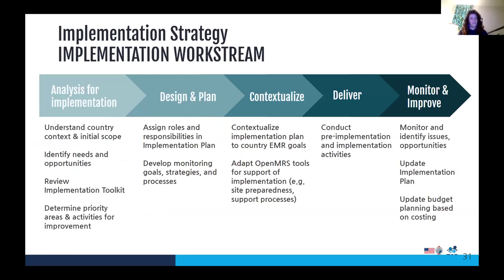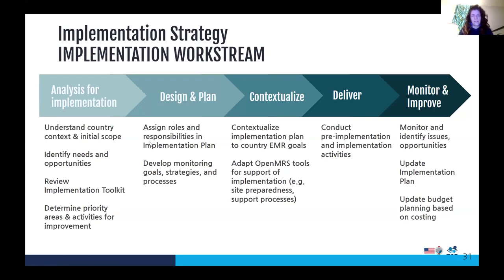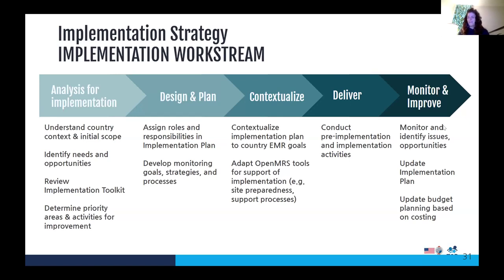The implementation strategy work stream goes like this: first there's analysis for implementation, then you design and plan, then you contextualize the toolkit, deliver it, and monitor and improve it. The first big step is understanding the context, identifying the needs, reviewing the toolkit itself, and determining priorities and activities for improvement. Then you assign roles and responsibilities and develop monitoring goals and strategies in the design and plan phase. Then it works to contextualize implementation plans to the country's EMR goals, adapting the tools in support of implementation, conducting pre-implementation and implementation activities, and then monitoring and improving.